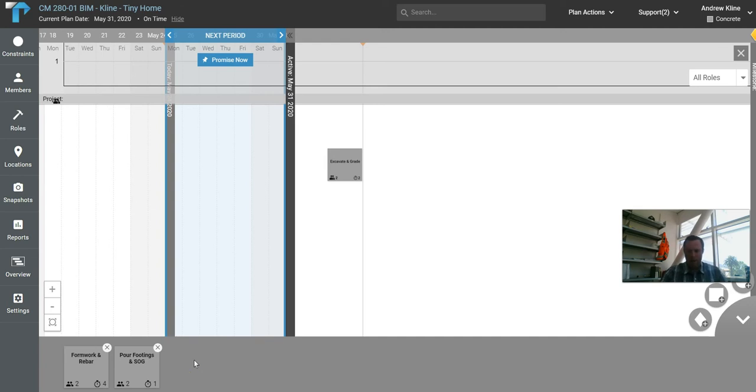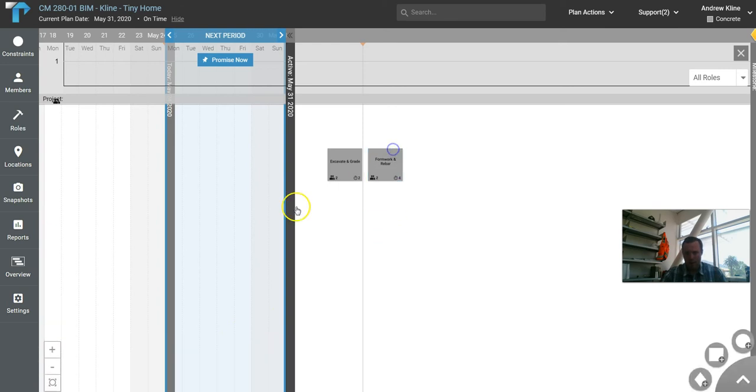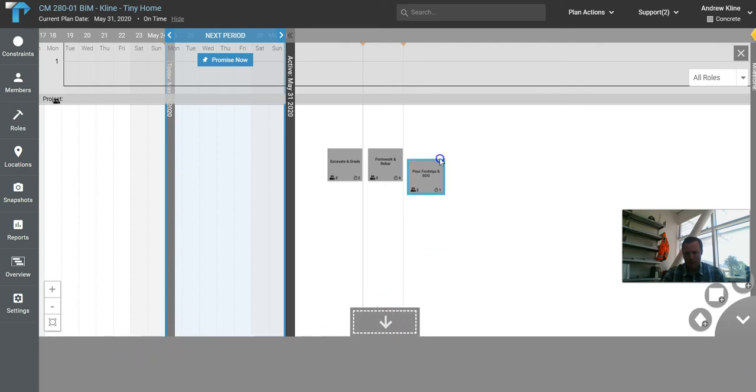So I am not telling you the predecessors for everything. A predecessor is exactly what it sounds like. It means that one activity can't start until that predecessor is complete. So if you see in your concrete section, I just listed 3 activities. So just assume, unless I tell you otherwise, that if they're in order with the way I list them, that's going to be how they fall in your schedule in that order as well. So that's just saying excavating and grading goes first, formwork's going next, and then I'm pouring this.